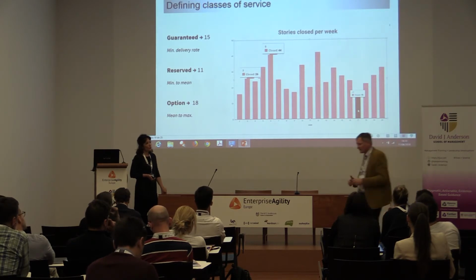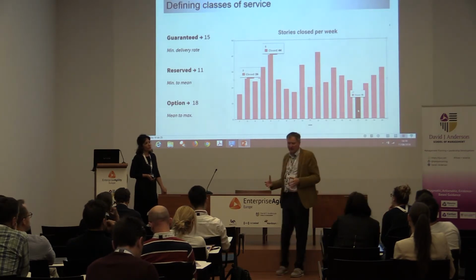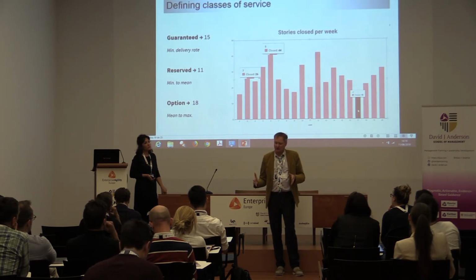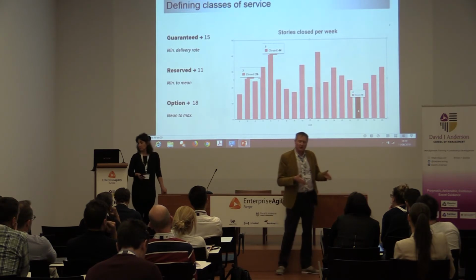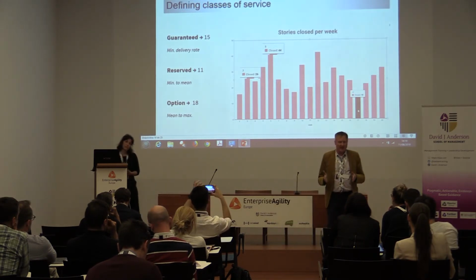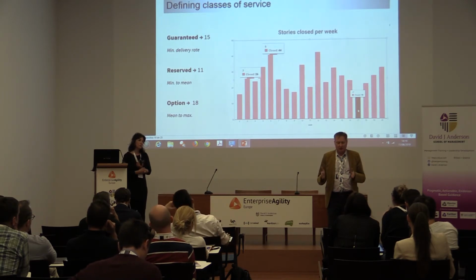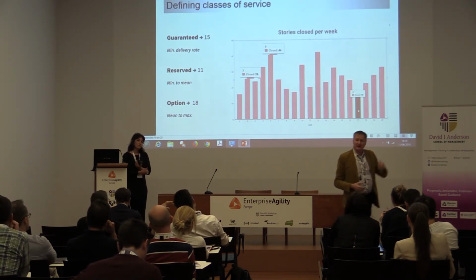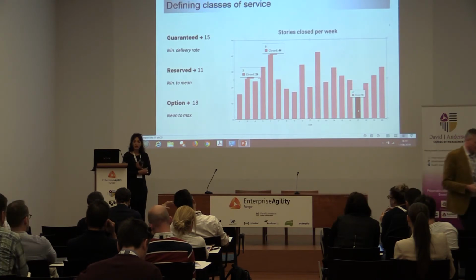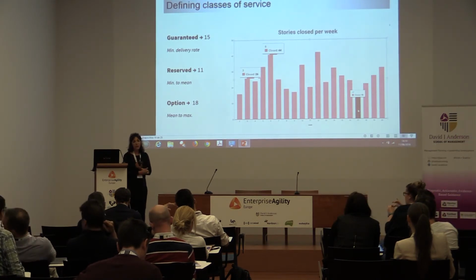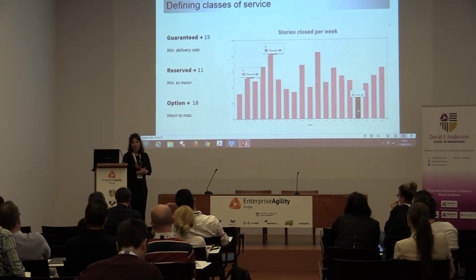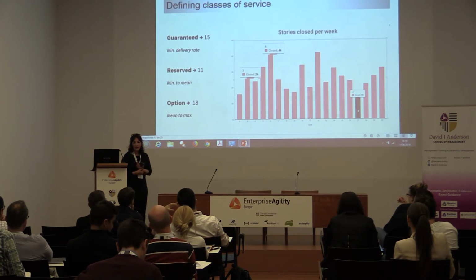So things that have an importance, a high risk, a fixed delivery date, a high cost of delay, they need to get booked in the first 15. And the ones that are on the margin, depending on the cost of delay or other risks associated, go into the second or the third category. Or imagine that you need to cover a minimum number of bug-fixing tickets based on your demand. You need to cover that, yes or yes. There's no option for that.